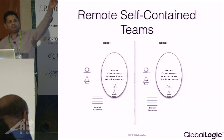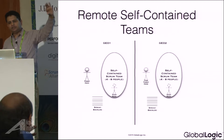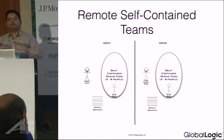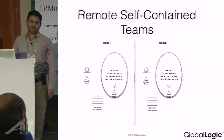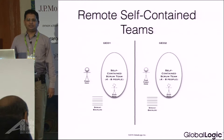These teams have to make sure that end-to-end integration happens frequently. They can work on one vertical slice where part is developed by one team and another part by another team, but they have to integrate within one sprint, for example. If that integration is not happening, it creates big troubles. People feel very happy working in isolation in their own island, and when they start integrating after three months, I have seen people struggling for months just to integrate stuff.